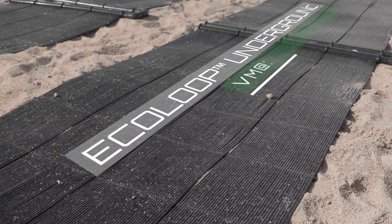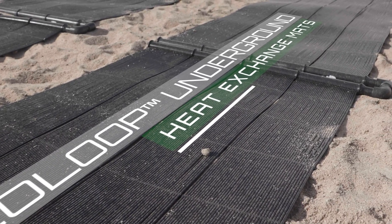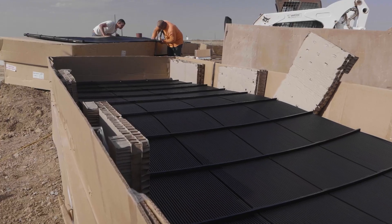It's much less labor and minimally intrusive on the site. It's also relatively quick to install — about two days per greenhouse — which means this is three greenhouses plus a head house, about eight work days with three people.